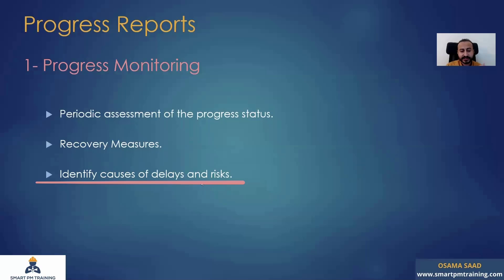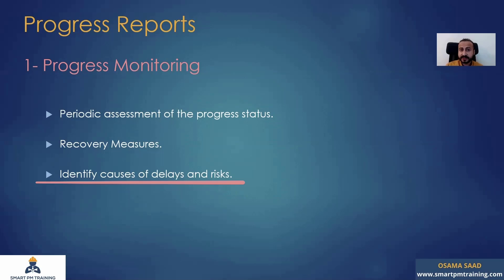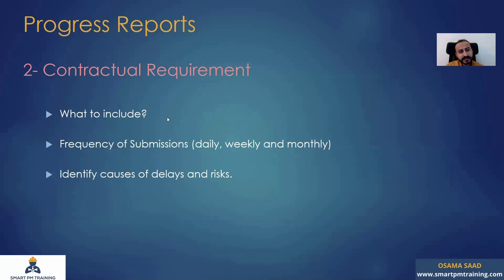Identify causes of delay and risk. You may know that the overall project is in delay by one month, but what is causing the delay? Maybe you are performing very well in concrete, but you have a disaster in block work. Maybe you are not in delay yet in paint work, but there is a risk that this activity will be in delay. For example, you placed the procurement order for paint material very late and it's a long lead item which will take two months to deliver. The paint activities are not in delay yet, but there is a high risk that they will be. You need to identify that and act accordingly.